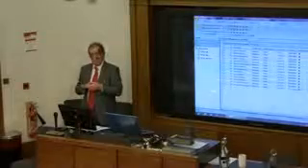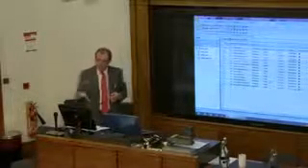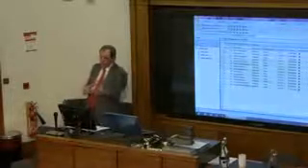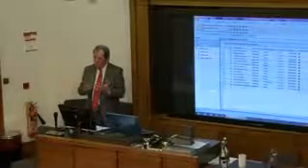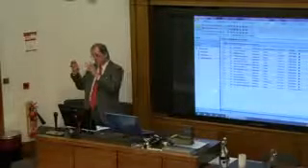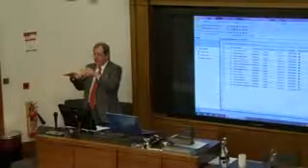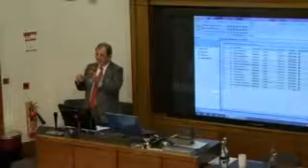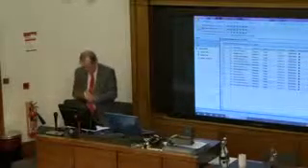That doesn't happen with Primavera. The Primavera algorithm is the same one as in Fuse. It's only in MSP where you get these 2 days difference, caused by the milestone date. When you put a milestone date in, it's normally the day before.